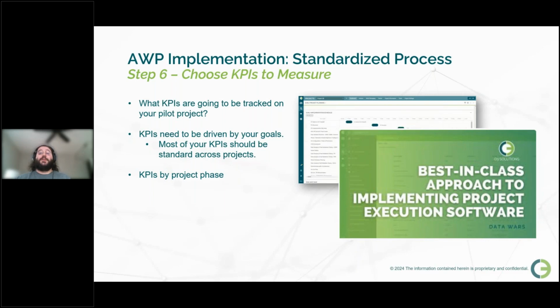Whatever your KPIs are, you want to make sure that they are standard across all your projects and across your different portfolios. Sure, some projects might be unique. Each project is bound to have its own nuances, but the goal here is to be able to standardize your reporting so that you can use your past measurements to forecast future ones. Doing this allows you to lean forward a bit more and anticipate, rather than just standing there and seeing what we could have done better after the fact.